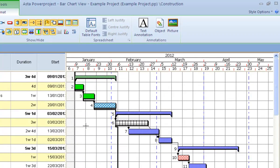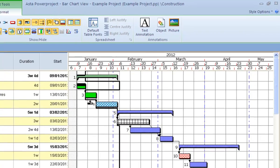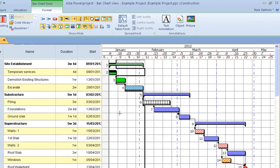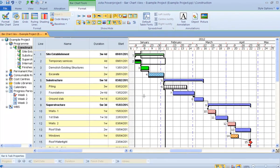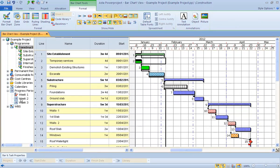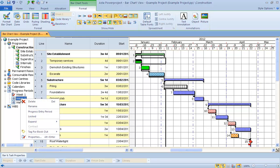And as I start to put my progress in, I'll make that, let's say, 100% complete, then it scores that through. If I then want to go down over here and put in my next week's progress, I right-click and progress entry period.